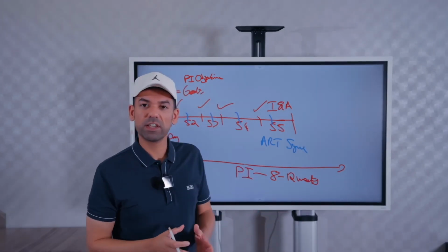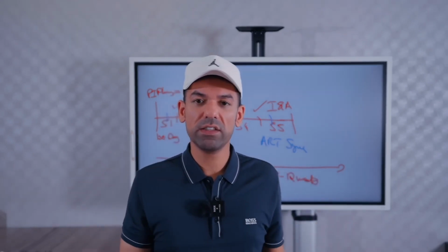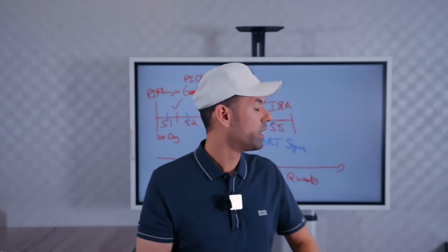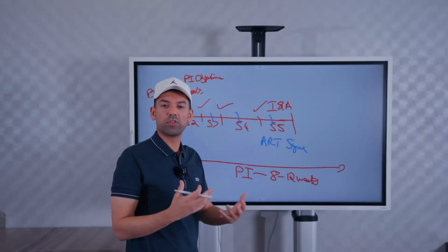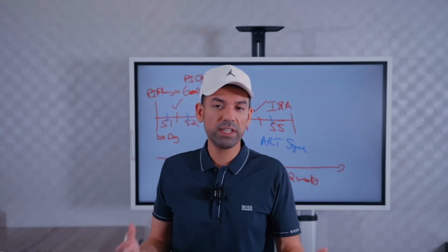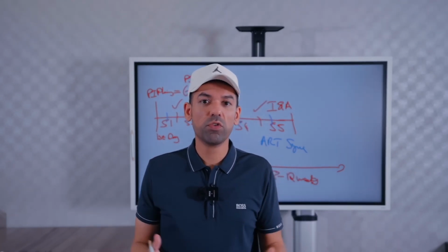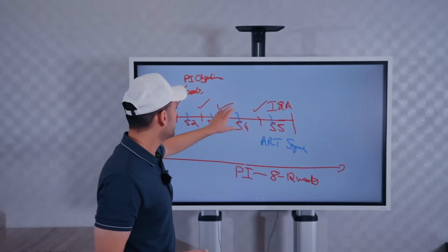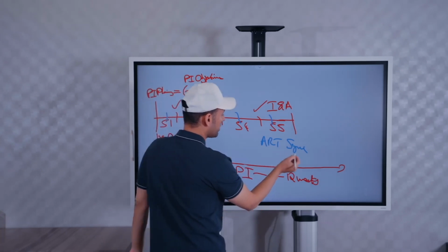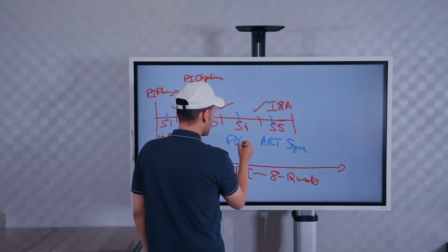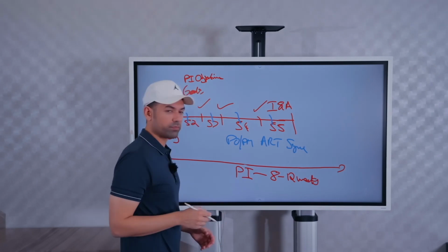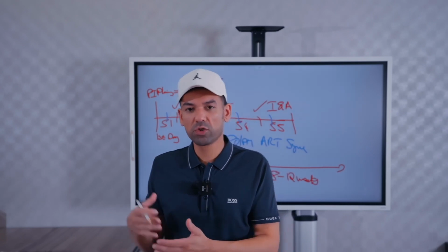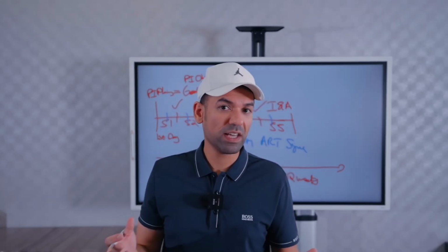An ART sync meeting is whereby all the Scrum Masters and the team coaches and the release train engineer get together and synchronize to see where the problems and issues are, and how they can maybe remove some of the dependencies and risks. Then you also have another one for the product owners and the product managers. Another synchronization meeting where they'll be discussing progress and any scope creep or items like that.